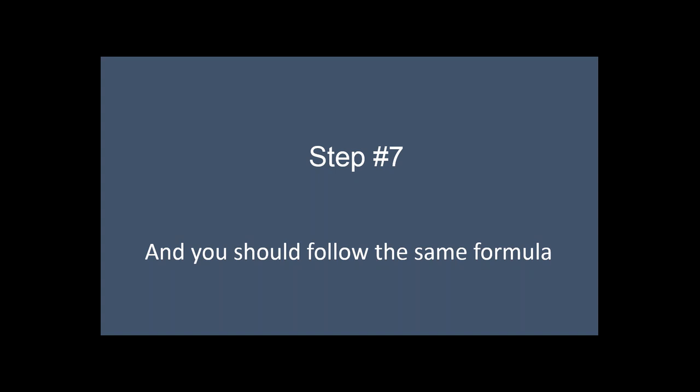And you should follow the same rule. When you are giving an estimation to your customer, you have to give them 13 to 15 days. Now why? Because as I said, you are also handling multiple projects at a time.